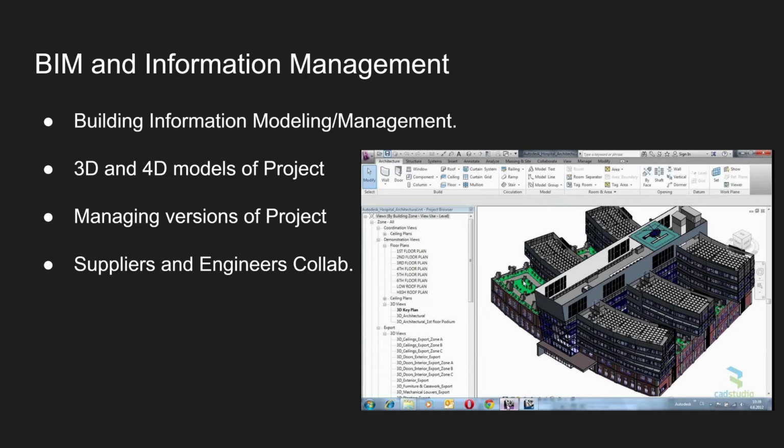So instead of Google Docs where you just make a copy of the document and then try to manage all those different copies, the way you actually do it is on a program like Autodesk, where they go in and make one central 3D model, and just like we discussed before, they make a branch of that 3D model where someone makes a change. And you can try to push your branch back to the master. What happens is Autodesk will actually highlight any errors. If two measurements are off from the original, it'll highlight that error, and the change control board can figure out exactly which one they want to pick.